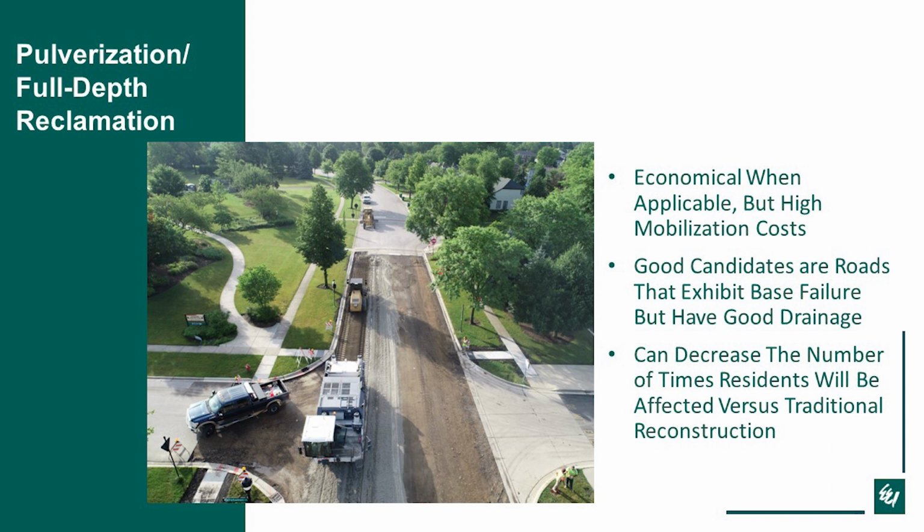And then it will, as discussed, greatly decrease the number of times residents will be affected versus the traditional reconstruction. So it's able to be done under traffic, and once they're done doing the reclamation and the cement, the residents are able to drive on it the same day while the cement's curing.